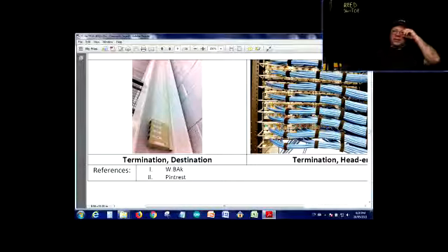Because if you do it first, they're not going to be able to do their job, and there's a chance of things getting damaged. Things can be painted, jacks can be painted. That's no good, right? So here's one example of a final destination.